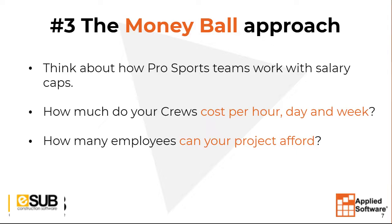But how many project managers really sit down with the superintendents, right? And when you're building the crew out, figure out how many bodies can you afford? James, is that a crazy concept to bring into our industry, of thinking about hourly rates with burden? And if you're seeing there's 1,000 hours in the project, has anybody taken 1,000 hours and multiplied it by your labor rate, to see if that lines up on your profit chart? Yeah, you definitely need to be tracking that if you're not already.